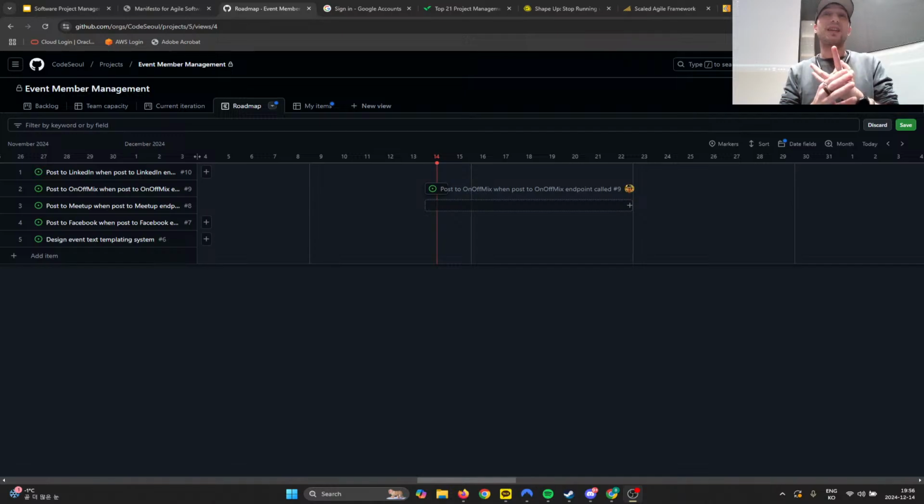Now, that does have the potential to slow things down, but we work very hard to minimize that. And because the stuff becomes more predictable, we can at least figure out ways to keep it from slowing things down by basically leapfrogging projects with her. Does that make sense? Yeah. So I do not recommend having a QA person work on multiple projects. To me, that seems dangerous.